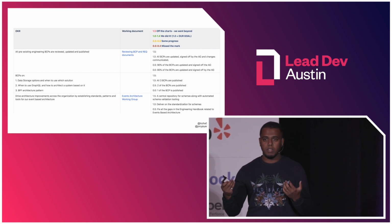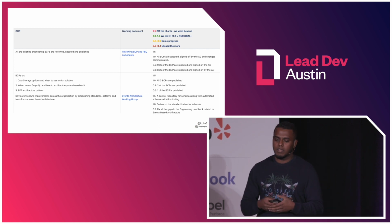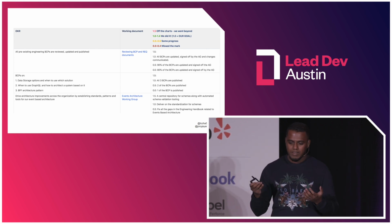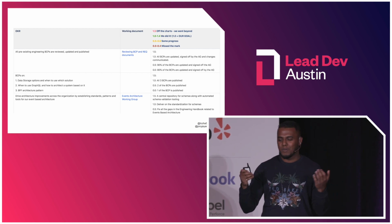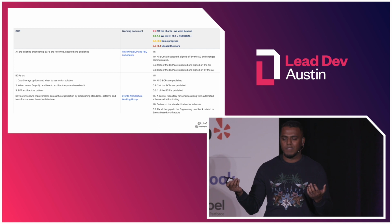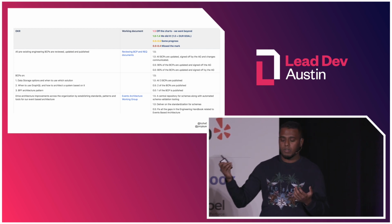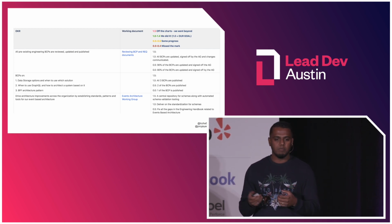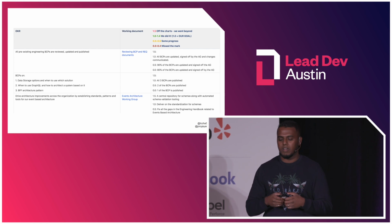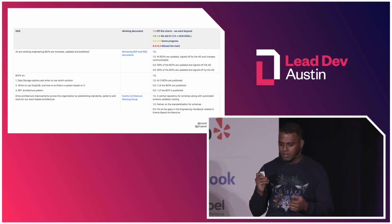We would do a midpoint check in the quarter just to see how we're progressing and get a score, and then score toward the end. So scoring is kind of trivial. Some people still get confused. 0 to 0.4 means you're actually not getting where you want to be, versus yellow, you're making progress, not quite there yet. 1.0 to 1.4 is you're hitting the goal and going above and beyond. And if you give yourself anything above that, you're just really killing it. And we had a couple this quarter that we actually killed and a couple not so great.